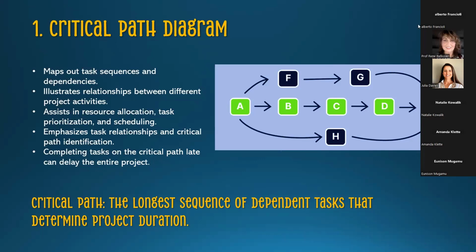So I'll stop a moment just to be sure that you're all with me. So critical path writes down all the activities. Then it tries to draw it by hand. At this point, we're drawing it by hand. These activities using the times to completion of every activity A, B, C, D, F, G, H, up to the outcome, which is E. It also takes note of which things can happen at the same time, in this case, F, B, and H can happen at the same time. That's why they're on different paths. G is after F, but H only has A before it.